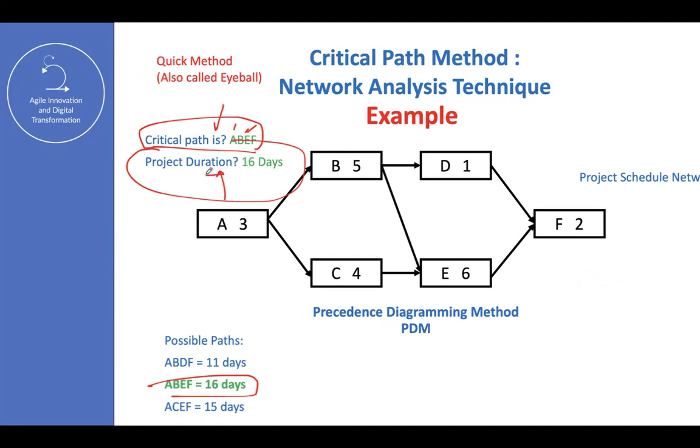At the beginning, it's a little bit complicated, but you will see that it's logical. You have a lot of activities. The only way that you can define the duration is by aggregating the duration of each one of the activities, of course. So the longest path through the network is the project duration. And the critical path is the list of activities that you cannot delay. You cannot be late if you want to finish the project on time. So you need to prioritize your time and focus on those activities, because if I don't complete this activity on time, it's going to impact the final implementation date.